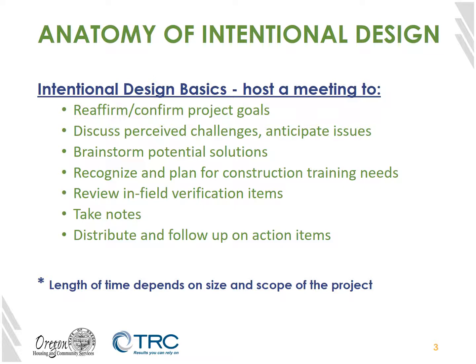There's not a set amount of time that an intentional design meeting needs to take. We've worked on various projects where they've happened in as short as 45 minutes for some simple measures, and as long as a half to 3/4 day for more complicated projects and more complicated measures that are being installed. So really, after you put your agenda together and start to think about who will actually be there and start working through how this will likely pan out, you can then schedule how long of a meeting you believe you will need.